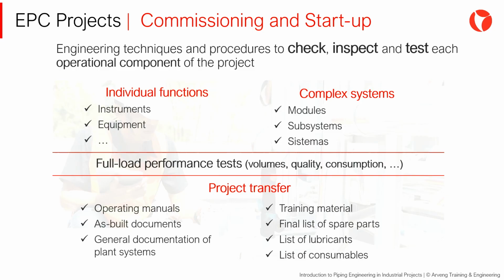In a project, transfer means the handover of the system, area, building, or component from the construction phase to the owner, who is responsible for the operation and maintenance of that asset. A set of standard procedures and protocols is used for the transfer, allowing for an orderly startup and smooth transition toward the regular operation and maintenance of the industrial facility.